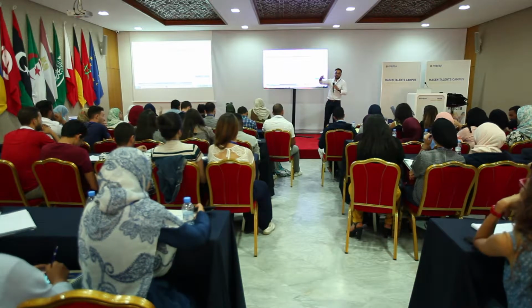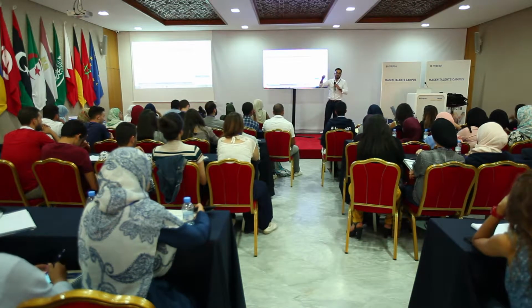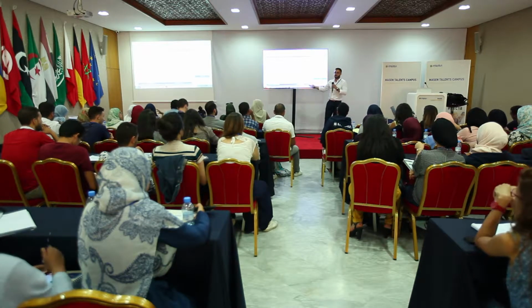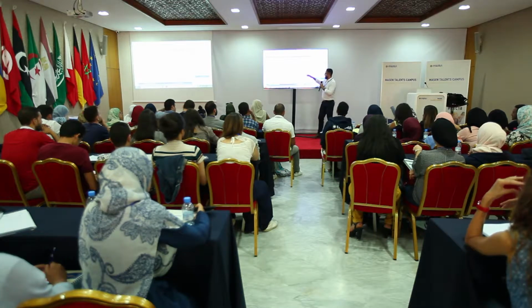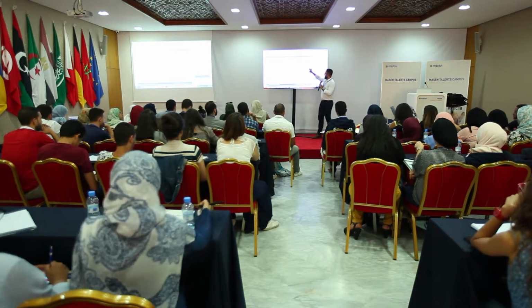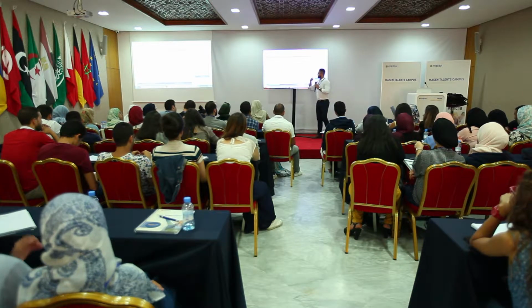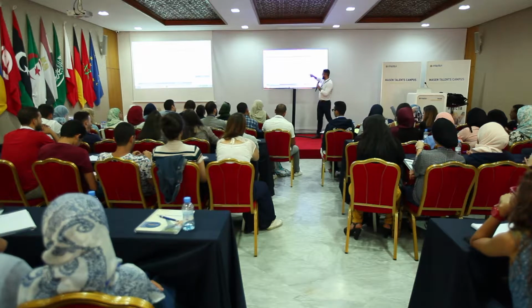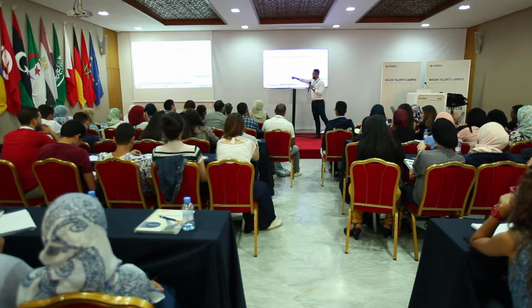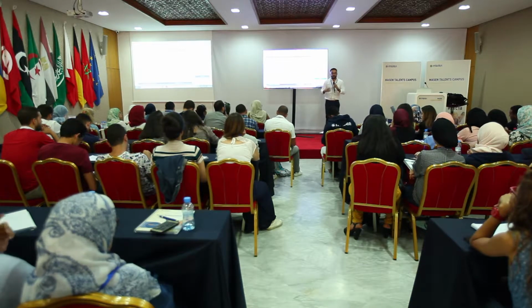But here, then, if they get a contract on the premise that they can build what they promise here, they need to go to banks, and together with some own money, there's usually a ratio of 20-80 in CSP plans, meaning 20 comes from own money from the development company or equity holders, you say. And the remaining 80% comes from debt. So it could take up to a year or 2 years.